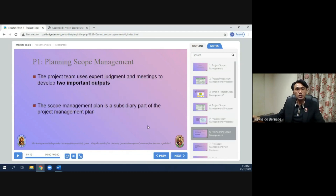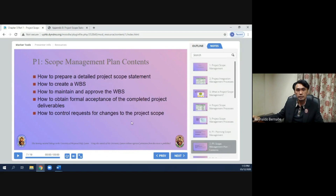In planning scope management, the project team uses expert judgment and meetings to develop two important outputs. The scope management plan is a subsidiary part of the project management plan. It describes how to prepare a detailed project scope statement, how to create a WBS, how to maintain and approve the WBS, and how to obtain formal acceptance of the completed project deliverables, and how to control requests for changes to the project scope.